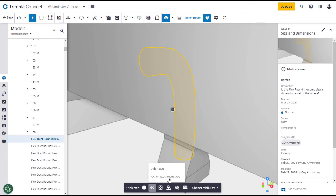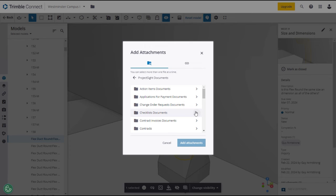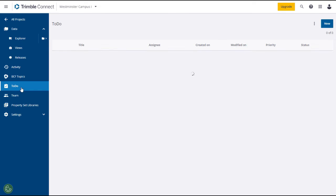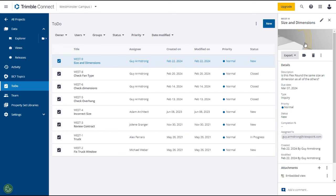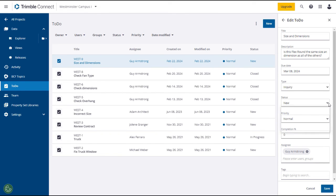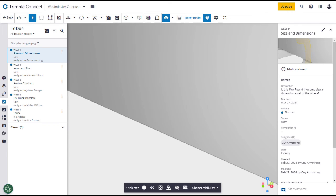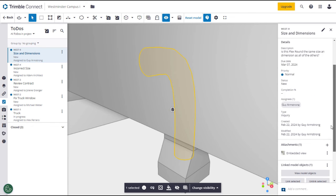Note that other project site records can be linked from this page. Items such as specifications, RFIs, and submittals are frequently linked with to-dos and models to point directly where the question or issue is located on the project. Returning to the Trimble Connect main page, you can click on To-dos and see the newly created to-do in the register. Click on the to-do line and its details will open in the right panel. You can edit the details, for instance updating the status if a response or comment has been entered. Also note that when creating the to-do, a new view has been created and attached to it. Clicking on the attachment or on the image in the upper panel will open the model view where it is marked with a checked box icon. Seeing the comment, the author or other user with permissions can mark the to-do as closed.